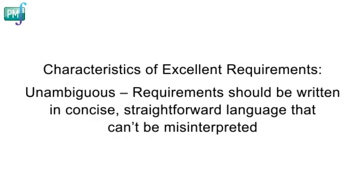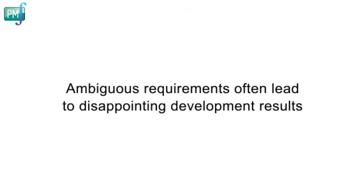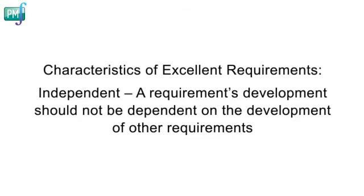Requirements should be unambiguous. Write requirements in simple, concise, and straightforward language so that nobody reading them could possibly misinterpret them. If requirements are not explained precisely and completely, there is the danger that developers will end up trying to fill in the blanks on their own. Requirements that are too ambiguous could also end up creating different expectations on the part of stakeholders, leading to disappointment with the development results. Requirements should also be independent — if a requirement's development is dependent on the development of other requirements, it might cause prioritization and planning problems.